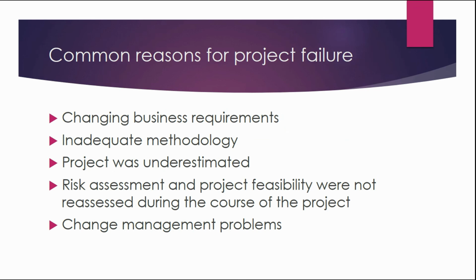Here I list some of the common reasons for project failures. A project can fail or it can be a success, and it's determined to be a failure when you have changing business requirements, you don't appropriately apply your methodology, your project was underestimated during the initial assessment phase, the risk assessment and project feasibility were not reassessed during the course of the project, or change management problems, which is basically what project management is designed to do: to manage the changes that happen throughout the course of a project.